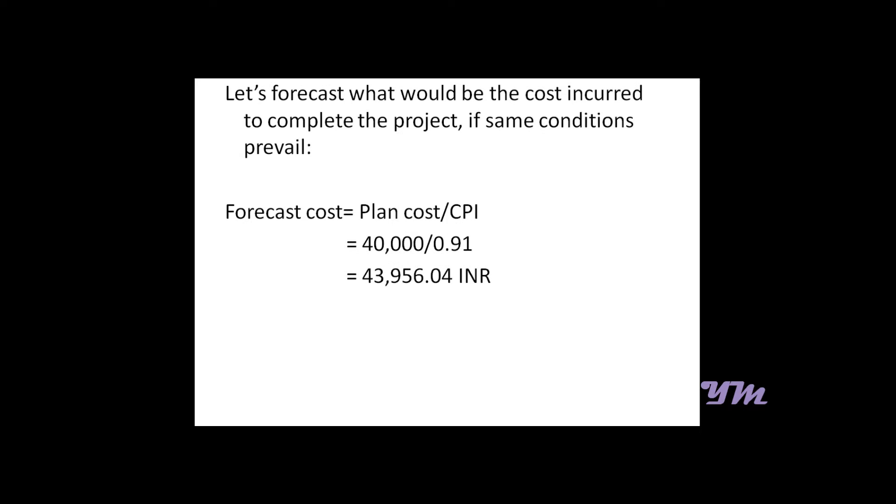Now let's forecast at what cost the project would be completed. The forecast cost equals planned cost upon CPI, so that is 40,000 upon 0.91, approximately equal to 44,000, thereby reducing our profit margin from 5,000 to 1,000.